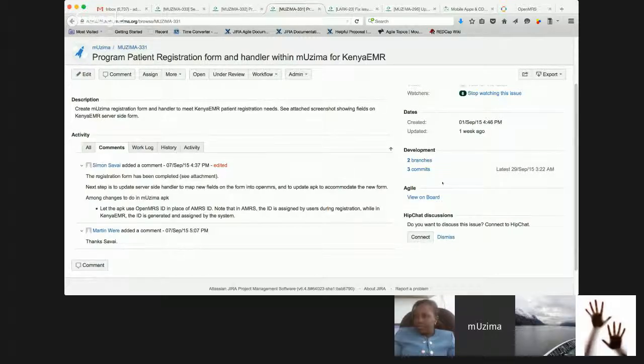That is the tag that Jira would look for, and if there's a tag with that, it will update the corresponding Jira with the GitHub information. If you don't include that, it will not be able to automatically pull that information. So I think from now on we need to make it a mandatory practice that every pull request and commit needs to have the Jira ticket number.